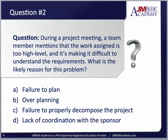Question number two. During a project meeting, a team member mentions that the work assigned is too high level, and it's making it difficult to understand the requirements. What is the likely reason for this problem? A. Failure to plan. B. Over planning. C. Failure to properly decompose the project. Or D. Lack of coordination with the sponsor.